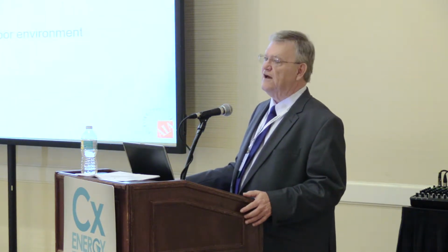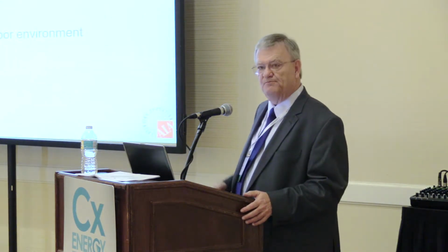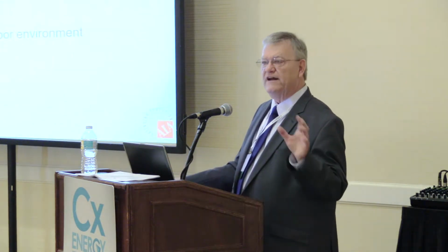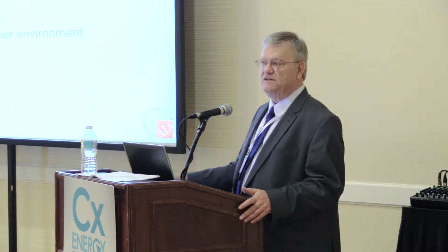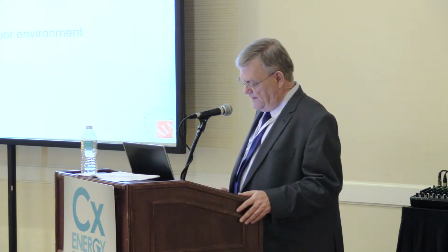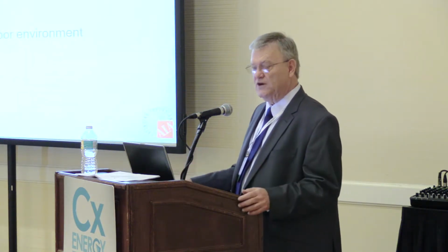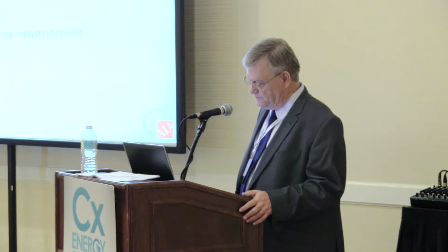Is anybody here practicing in California? There's plenty, and it is a very complex set of requirements. When we see it, you'll find that my reference to Title 24 is grayed out, like an option you get on your computer when it's not going to let you do that. We're not going to be addressing Title 24 in detail because there's just way too much material. If we don't design to the level of control that those codes call for, we don't get a permit, or if we are lucky enough to get a permit, we don't get a certificate of occupancy at the end.